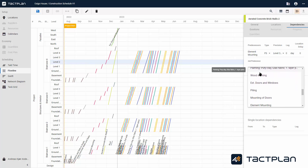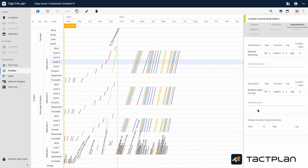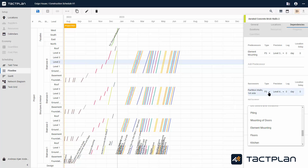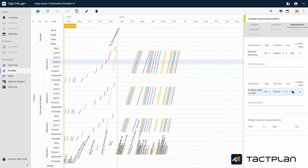You can choose which type of dependencies there should be. Here we start by choosing predecessors and then choose a successor. We also choose which level it should be on and whether there should be a time lag between tasks, and finally whether there should be a location delay.